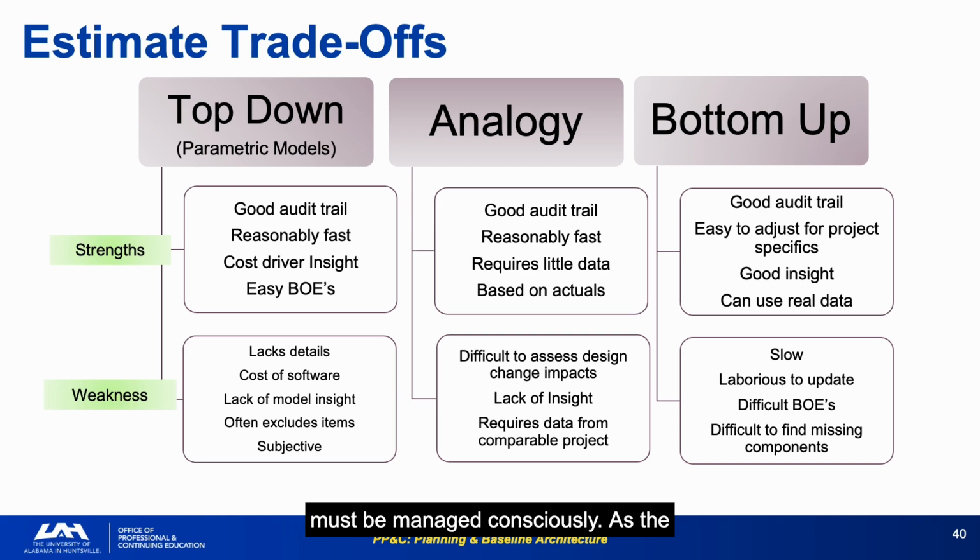As the project gains definition, the parametric baseline should be validated against bottoms-up estimates for the key cost drivers. Discrepancies require explanation. Review boards know this chart. When they see a Phase C program using parametric estimates for major subsystems that have been in fabrication for 2 years, they ask why, and the answer usually reveals something about the quality of cost controls.